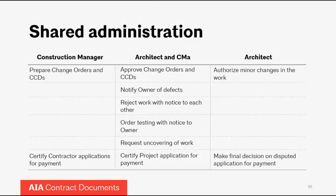The construction manager is often tasked with preparing change orders or construction change directives. Both the architect and the CM are going to have approval responsibility for change orders or construction change directives. There is also a whole host of things the architect and the CM share responsibility for — like notifying the owner if they discover defects, rejecting work, ordering testing, and even demanding that certain work be uncovered if there is some question about its adequacy.